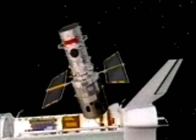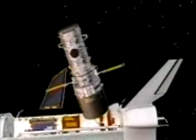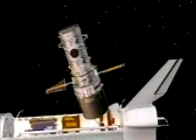The telescope is maneuvered down over the FSS and brought down into its latch position. There are three berthing latches on the FSS that will then engage, connect the umbilical, and transfer the telescope to our orbiter power. We'll then maneuver the solar arrays and prepare for our solar array retraction. As we slew the arrays, we pivot down in order to clear and get a good view for the crew from the aft flight deck as we begin retracting the minus V2 solar array. Once that's completed, we'll bring the telescope around 180 degrees and retract the plus V2 solar array. Again, each of these should take from start to stop, without stopping in between, of course, about 8 minutes.